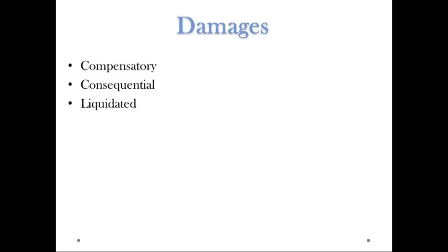And I worked on a big construction liquidated damage case once upon a time where it was my client that was at fault, and my client had to pay $3,000 a day times a month and a half, which is quite a bit of money. They weren't happy about it, but these can be a very effective way. And part of the issue there is how in the world could you ever calculate the actual damages to the city for a highway being late? So liquidated damages work very well in that situation.